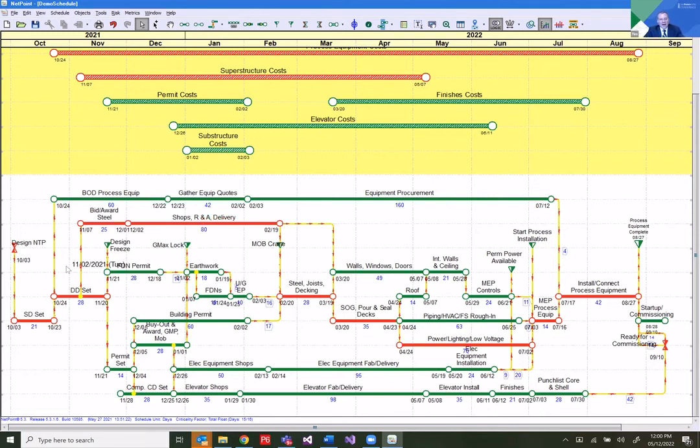The GPM algorithm allows us to track criticality and float calculations left of the data date, which the CPM algorithm does not allow. Given that capability, the ability to actually see the impact of changes to the right of the data date on the critical path to the left of the data date is just visual and graphical and real time.